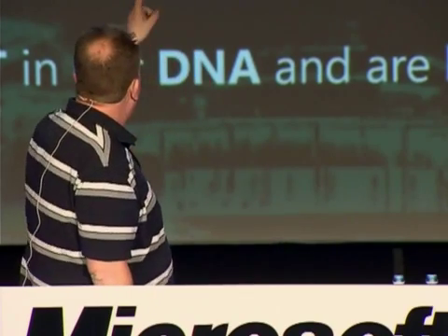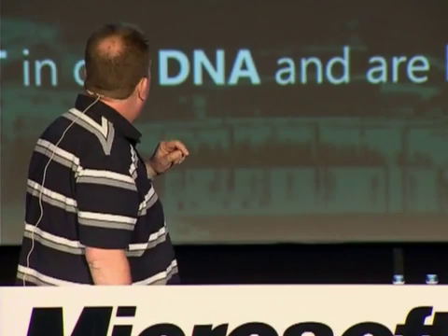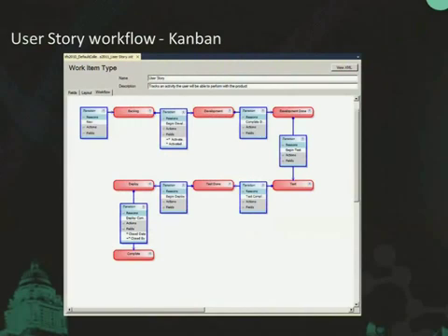Each of those transitions, if you look at them, the one between backlog and development there, we put some automated rules in that start collecting those metrics, those lead times, and you can have TFS automatically modify fields based on transition. So if I need to store the activated date when it transitions from backlog to development, so that I can measure the cycle time from when it was actually activated to when it was closed at the end, then I can capture that data there.